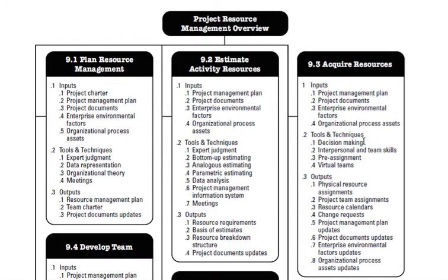And for that, we will use decision making skills, that is, which type of skills we need in our resources. Once I acquire the resources, I will assign them as a project manager according to the resource breakdown structure. So we will assign the resources, we will assign the team, that is, who will be working under whom. We will issue the resource calendar: I need this resource for how much time, daily, weekly, 2 weeks, 3 weeks, and after that I will release it.